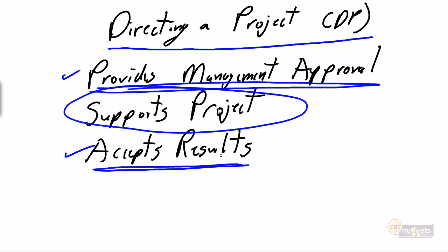But there will be times when I don't have the power and authority, because I'm not the senior management in the organization, to make decisions, to make things happen for my project. Maybe I need additional funding to buy new tools. Maybe I need to get a contentious decision resolved. I've got 3 different business units all requesting different decisions because it favors their own department. So I need to elevate that decision process to senior management. Maybe I have a business unit who simply is too busy to support the project. So I need to elevate that to senior management.